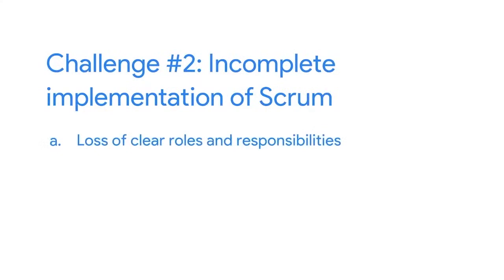To implement Scrum completely, you should define the roles for the team and then fill those roles with specific individuals. For example, if you try to have a developer also act as the Scrum Master, they might not have the bandwidth to do either role very well. Better to have developers be on the development team and you, the project manager, be the Scrum Master.